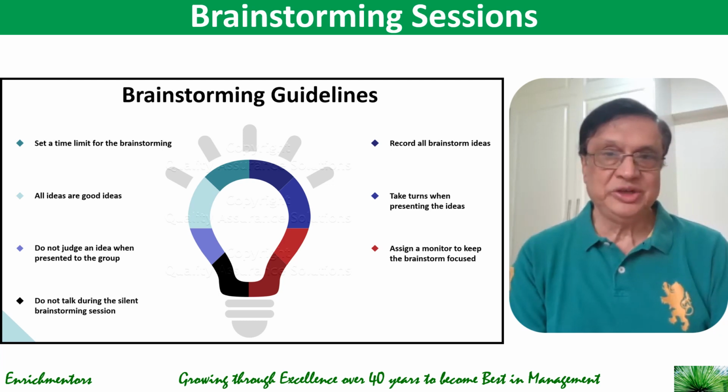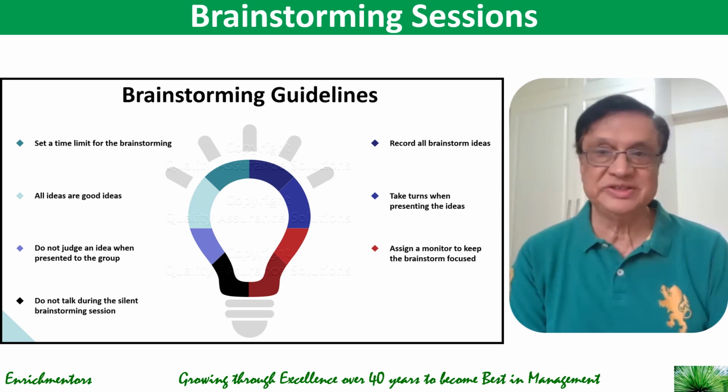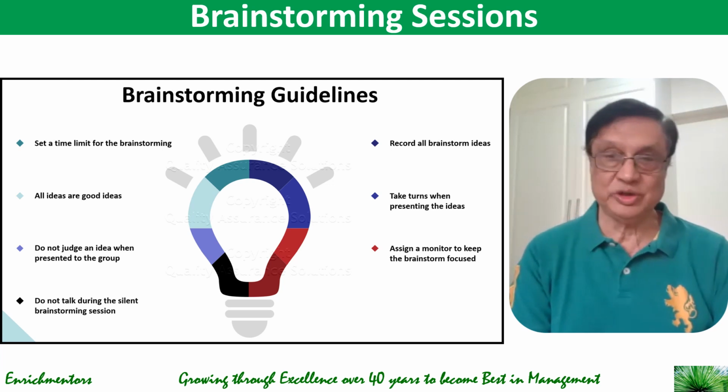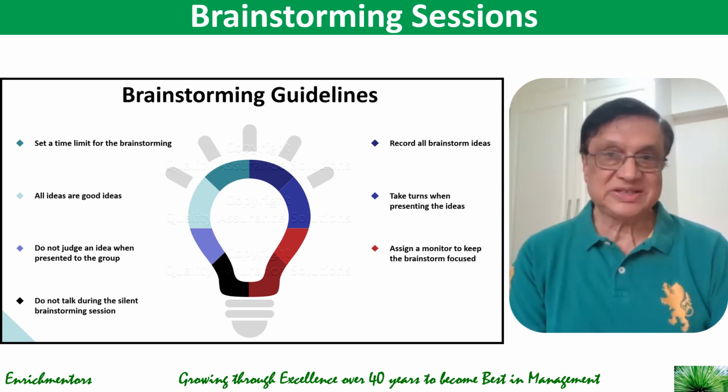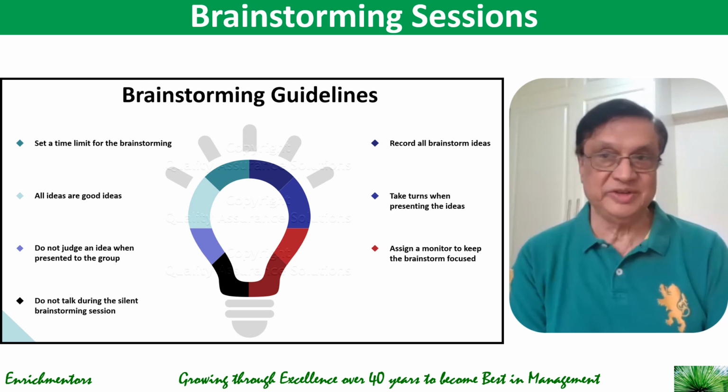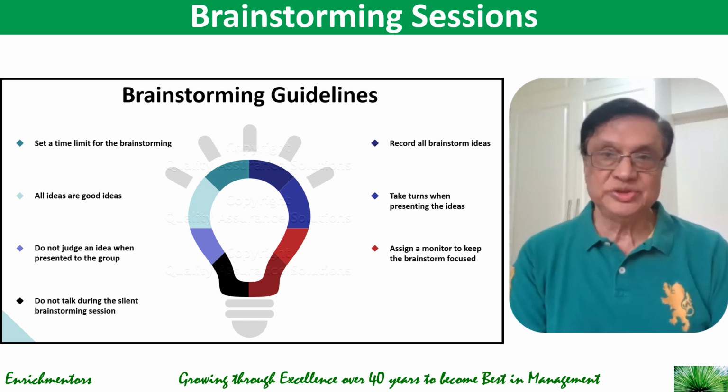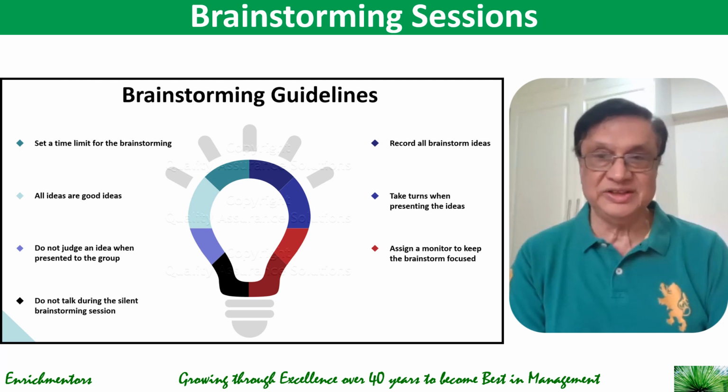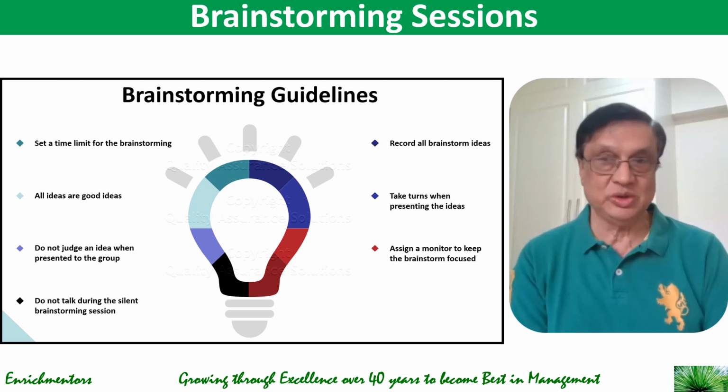And there you need to gather key project stakeholders for a brainstorming session to identify potential risk. Now, your best friends in this process of determining risk will be your critics, because they will look at your proposed solution a lot more critically than your friends or colleagues that are very friendly to you. So be sure to include your critics in this project stakeholders list.